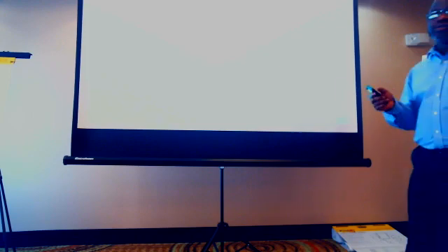I saw a decent amount of questions on 3-point. One example that I saw was provided 3 values and asked to pick which value the project manager should use for estimating cost. The tricky part here is that they provided insight into whether I should use triangular or beta. So do you guys remember what I told you about when to use beta versus triangular? If you have more background and previous information, you go with the beta, and if not, you go with the triangular. Go with the beta if you've got more experience. Good. All right. I'm glad you remember that. Don't forget, that's exactly what she's saying.